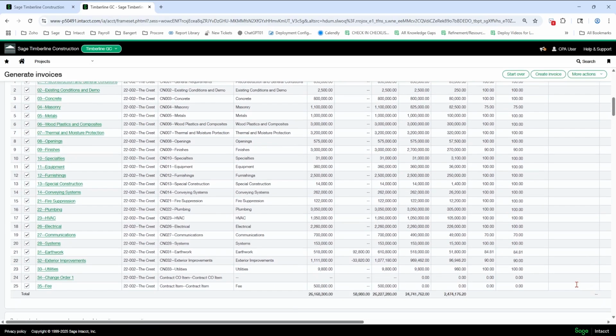Got my completed this period. I have to calculate what I'm going to bill for my fee. Okay, I cannot have this automated like I said. So if I'm going to bill $10,000 here, for example, maybe $5,000 up here, 50 grand. I've got a $60,000 billing I'm going to send out. So if I know that the fee on this project is 10%, I'm going to have to type in 10% here. Something you can do is type in, you can do math in the actual cell.